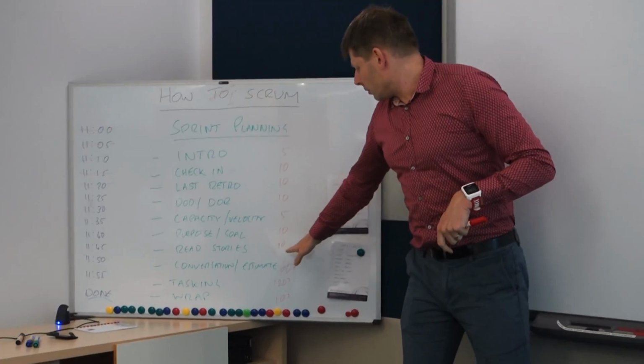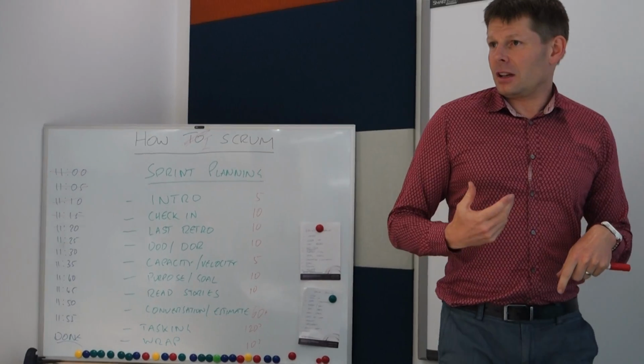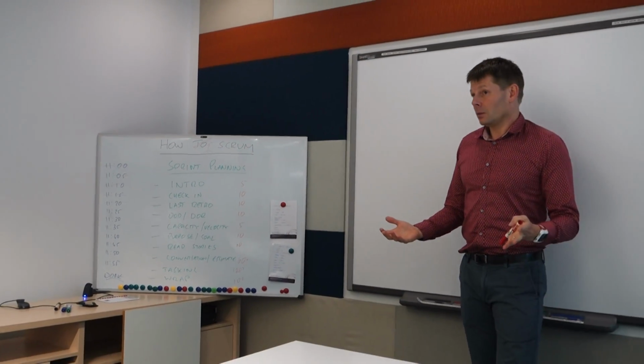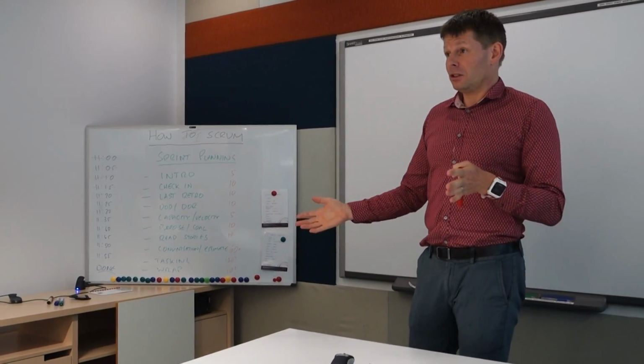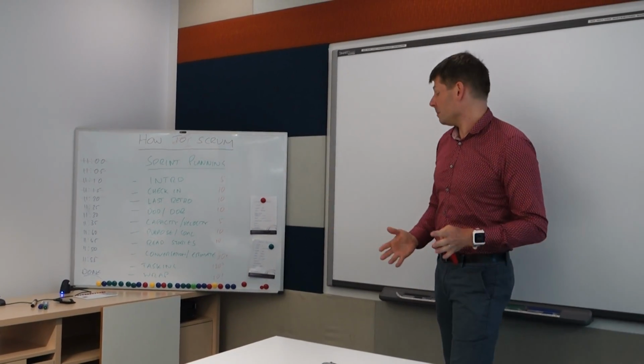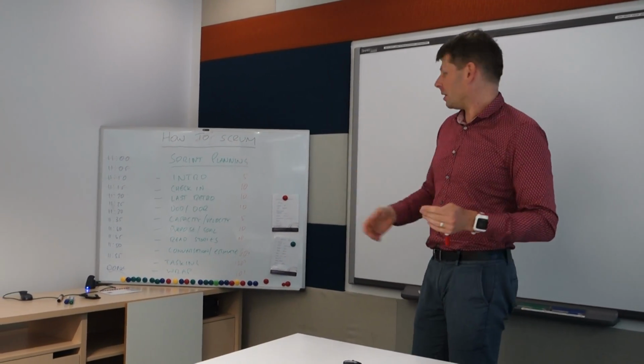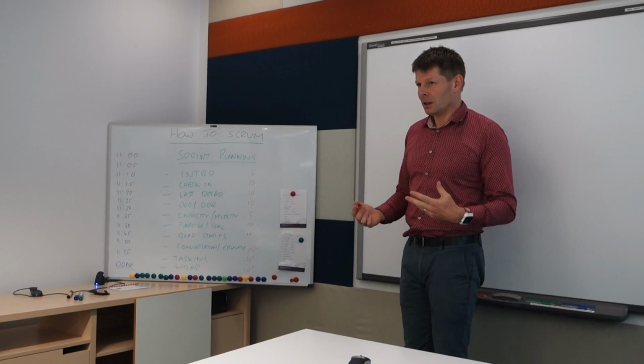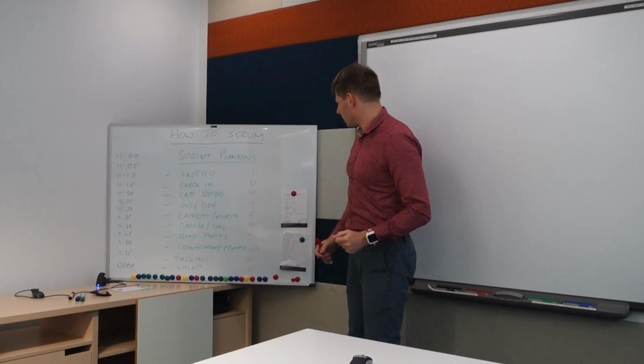Once we've got to enough stories where we've pulled in enough points that it meets, let's say, 40 points, we can probably maybe do a few more, just in case the team can pull them in, if you've got time. Or you may say, we're running a bit short of time, let's go into tasking them. So that's the what, that's the first part of sprint planning.